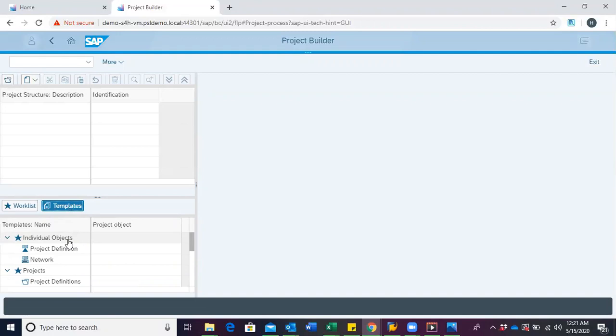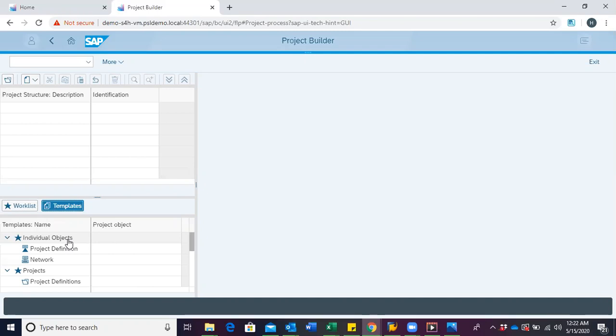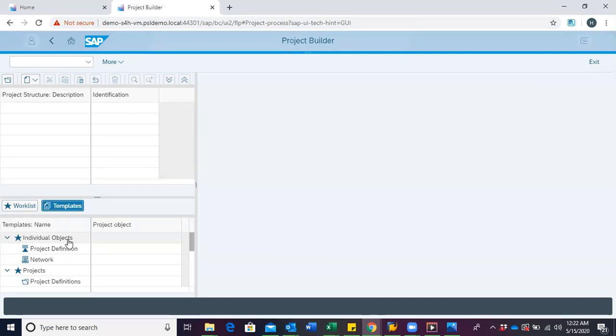To create a project definition, we would have to first start with the creation of a project. That goes to mean that in creating a project, the first object you create is the project definition. This is because the project definition is the framework for your project. And also, it contains the organizational information that are binding for the entire project.